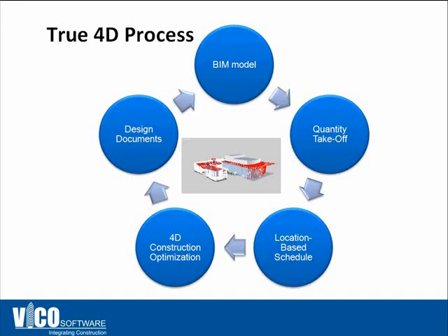So whenever you make a change in the design or in the sequence, you will be able to update the 4D construction simulation automatically. So it creates an environment that's a lot easier to use for resequencing or exploring what-if scenarios, and it also becomes a tool that you can use on site in the trailer, as opposed to just creating a nice marketing animation at the beginning of the project and then never updating it again during the course of the construction.